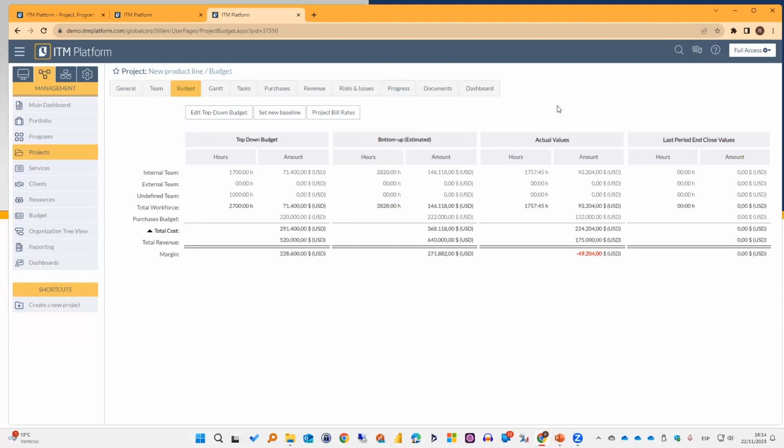The baseline will basically copy the data from the financial aspect. That will be the costs, the budget, the revenue, the margin, all that, okay? And it will also copy the planning data, like, for example, start and end dates, duration, effort, and all that. So it is, I'm going to say, a very complex, very comprehensive copy of your plan.